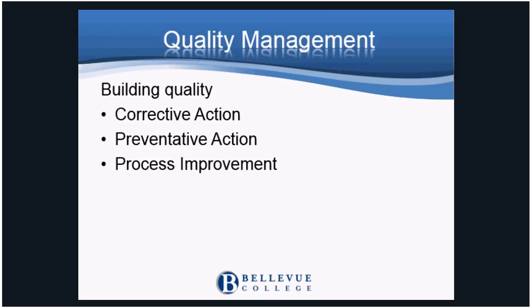It also takes risks into account, where events that trigger a risk starting to occur can be adjusted to avoid or mitigate the risk. In corrective action, the defect is caught and corrected by inspection, and the risk is resolved while it's new and can be managed. In each of these, there is an effort like rework to achieve the requirements.